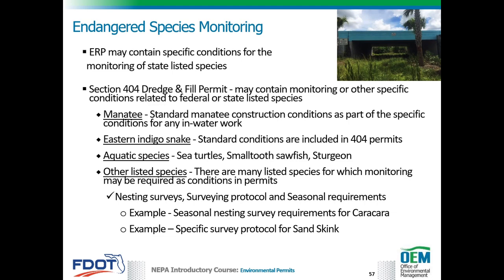State and federal permits often include standard manatee construction conditions as part of the specific conditions for any in-water work in water bodies accessible to the manatee. Eastern indigo snake standard conditions are included in core permits where the projects are authorized and include habitats where the eastern indigo snake may be found.